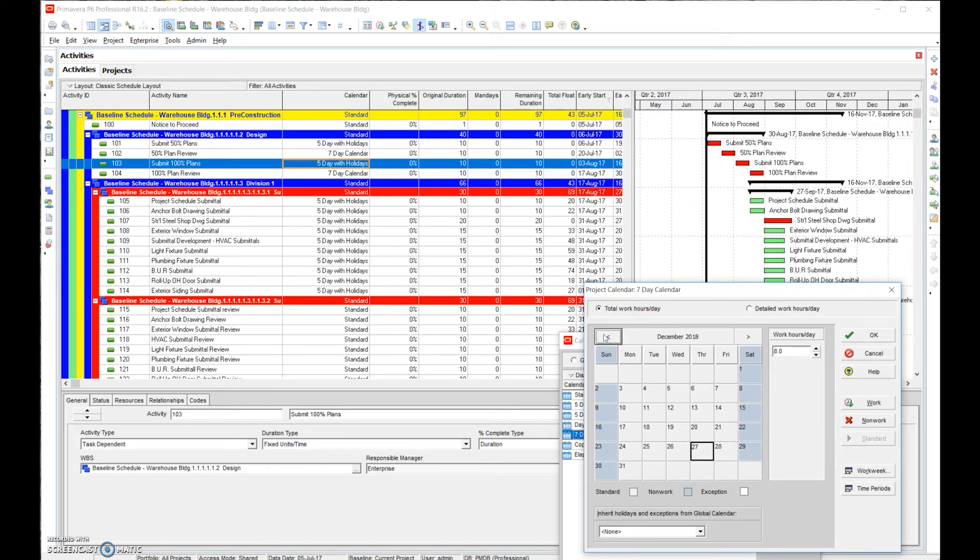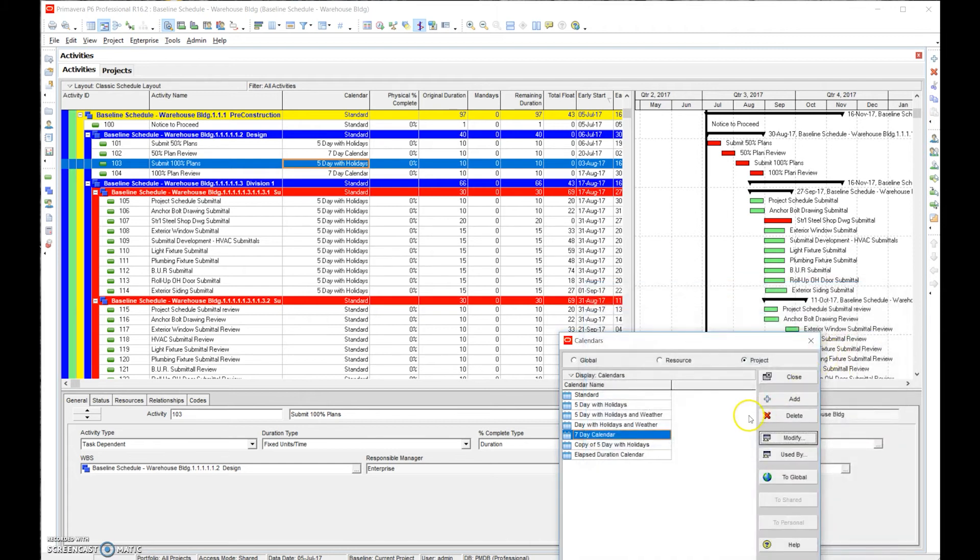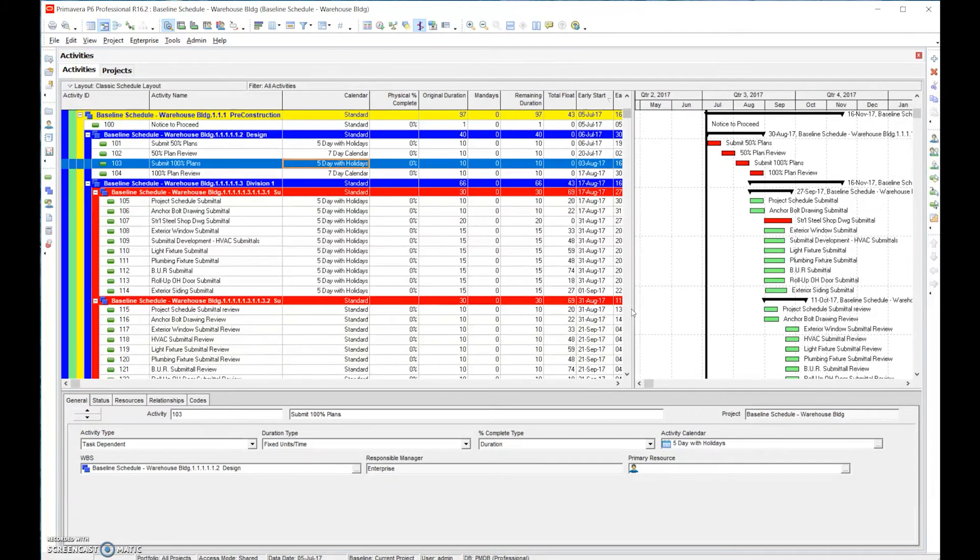We know we're gonna need to go through here and make these work days to make a seven day calendar. We're showing availability, that's all we're doing - we're showing the days we're available to work. We don't want the schedule to schedule work to occur on Christmas because we know it's not going to happen. We also want to anticipate weather.